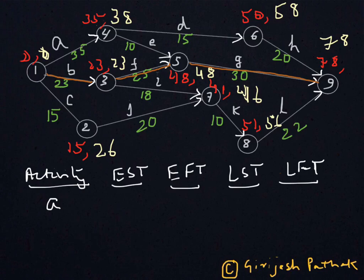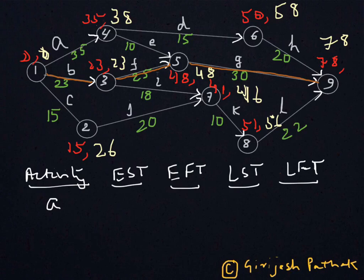The Earliest Start Time indicates the earliest time at which the activity can be started. So you look at the node where that activity starts. Activity A starts at node 1, and the earliest time for node 1 is 0, so you can start activity A right at the beginning. Therefore, the Earliest Start Time for activity A is 0.